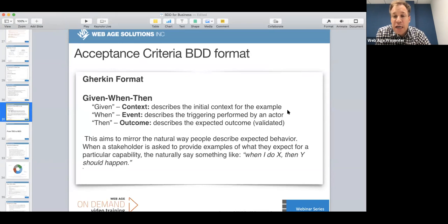Okay, who defines acceptance criteria is the next question. I'm going to answer that, but we're going to talk about specific roles and the timing of how all of this happens later. But the group of people that defines the acceptance criteria are the product owner, the tester, and the developer. They all three do it. They're called the three amigos. But we'll talk about that in great detail. I'll give you some charts here in just a moment.